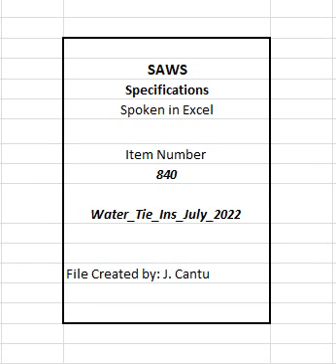840.6 Measurement. Tie-ins will be measured by the unit of each such assembly of the various sizes of tie-ins installed at the proposed mains to be accepted. 840.7 Payment for tie-ins will be made at the unit price bid for each tie-in of the various types and sizes completed from an existing main to the proposed main to be accepted. One such payment shall include shutdown and isolation of the existing main to which the new main is to be